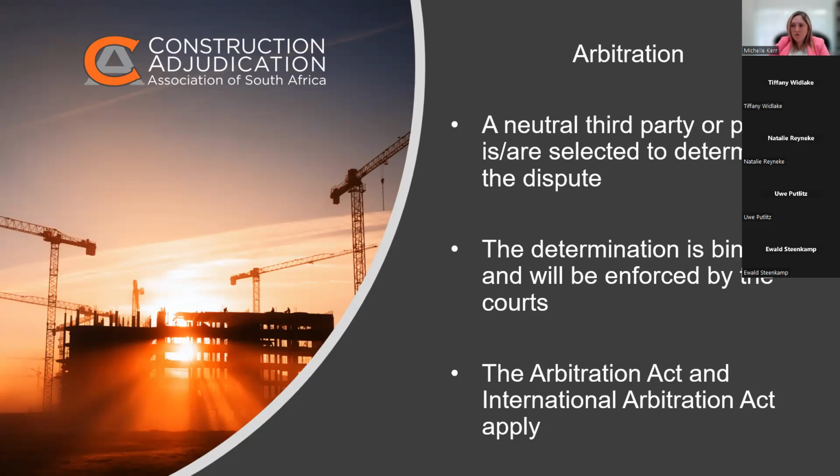Okay, so that's very different from arbitration, where if the parties haven't agreed a different procedure or set of rules, they can fall back on the Arbitration Act, which is always present and available to them. But just because the Arbitration Act exists doesn't mean that you automatically have a right to go to arbitration. That's not the case. The parties still have to agree in their contract or in some other form that they can refer that particular dispute or any number of disputes to arbitration. And once they make that agreement, then the Arbitration Act will apply where they haven't agreed alternative rules.